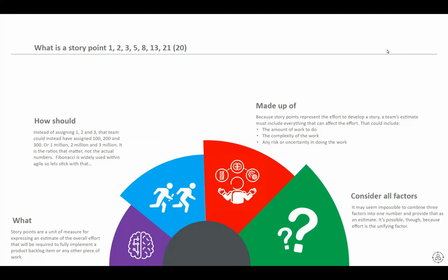So this is why we use this, and one of the reasons behind it is, if you guys do have an opportunity to look up on this, I'll send Zishan a few articles around Mike Cohn, who really pushes for using story points. I know there's a lot of arguments around using hours over story points, but you should never ever try to mix the two things together, and I'll go into that in a moment when we get into the next slide. Ideally you want to move away from that, and translating points to hours is not really the best benefit. You want to give a speed of relativity, and this gives you that.